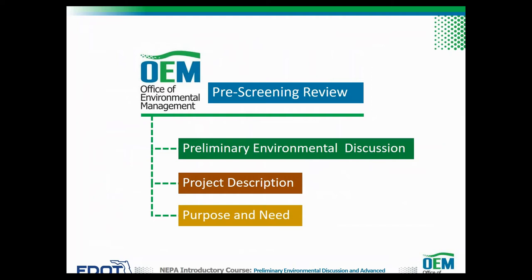The district is responsible for checking the data for completeness and accuracy before submitting to the Office of Environmental Management, or OEM, for the pre-screening review. Coordination and review by other district representatives prior to PED release and/or response is strongly encouraged. Other district representatives may include the environmental manager, district project development engineer, and district permits coordinator.